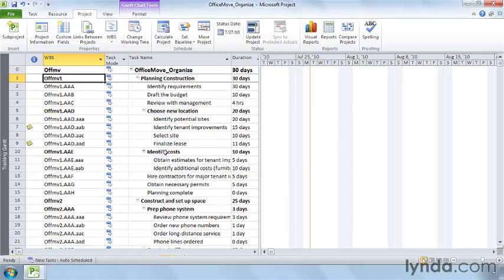Showing and hiding summary tasks is something you do a lot, and all it takes is turning on a checkbox. But to see WBS codes, you have to add the WBS field to a table in Project. You can use the basic WBS format that comes with Project, or set one up to match what your company uses. It's your choice.